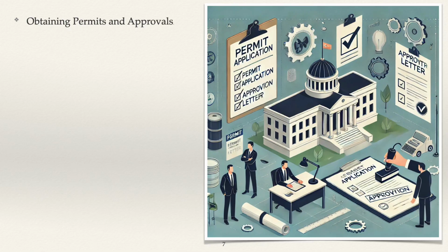B. Construction permits. General construction permits are often required for activities such as excavation, grading, foundation installation, and the erection of towers. These permits ensure that construction adheres to local building codes and safety standards. In certain terrains, civil work registrations and approvals must be obtained by the contractor before starting any construction activity. This process requires close coordination with the client to ensure compliance with local regulations.